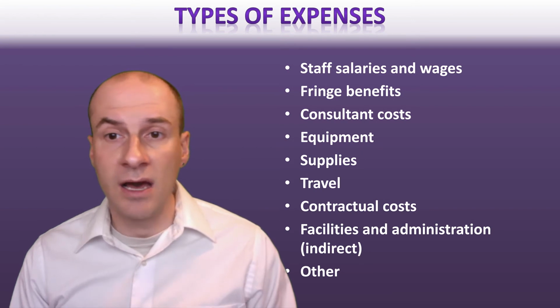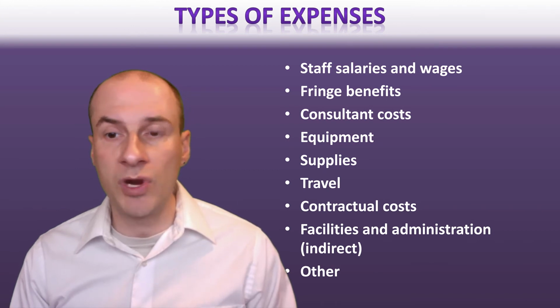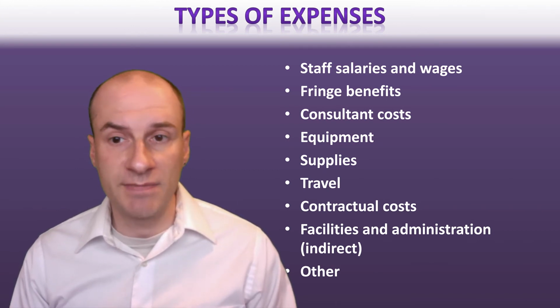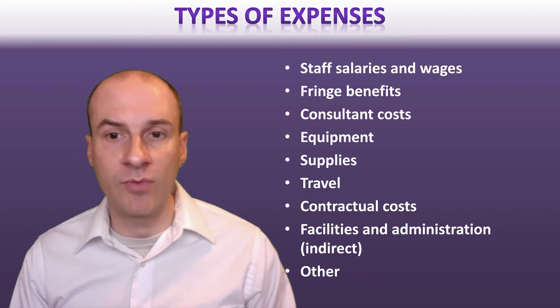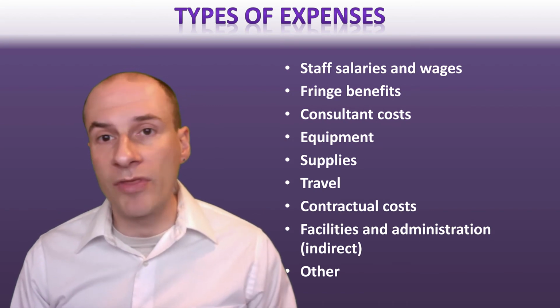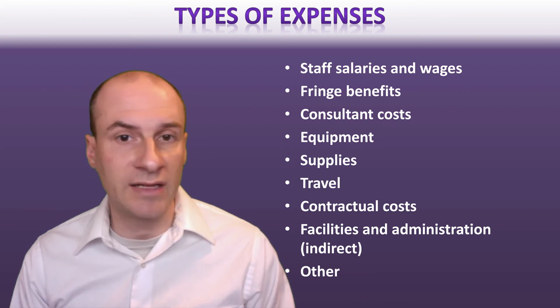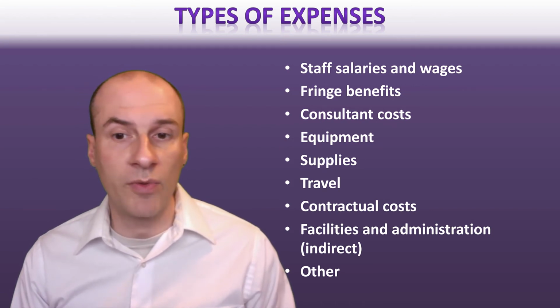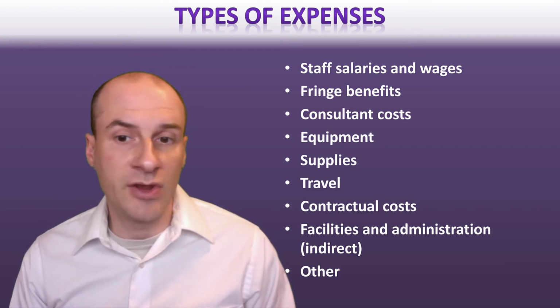Well, covered in the project would be the salaries and the wages for everyone who's working on it. Everyone who's working on it is going to be spending some time on it, and it's worth factoring in what the cost of that time and effort would be. Right? You'd also look at fringe benefits of various sorts for those people who are involved. You'd think about whether or not you need a consultant to work with you on a project. So, for example, are you going to be doing statistical analysis? Do you need to pull in a consultant to do that work with you, or an expert in a certain area of intervention that you're interested in?